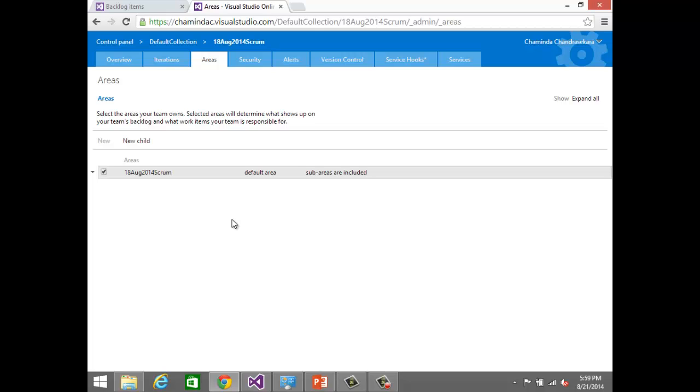But the real usage of this... most teams try to do that and go into a lot of troubles. Why? Because the number of modules expands a lot. So if you are trying to use this area for modules, it becomes a huge tree, and you lose the real usage of it. This area is there for you to use with actual teams. It goes with the team concept.